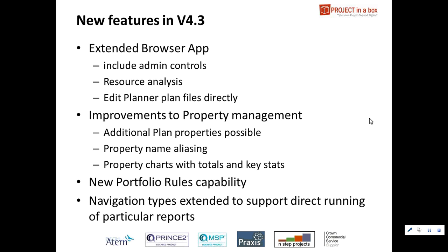Okay, so moving on to a couple of the other areas then. We've had a facility for some time for creating portfolios based on rules. This has been quite a popular thing. It was relatively simplistic in terms of the sort of rules that you could apply. You could create a rule to say put all the projects in a portfolio where one of the properties for that portfolio was greater than or less than or contained a match to a certain constant, a number or a piece of text. And you could compound those rules together. So that was quite useful.